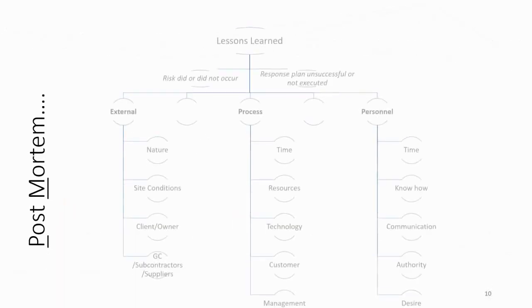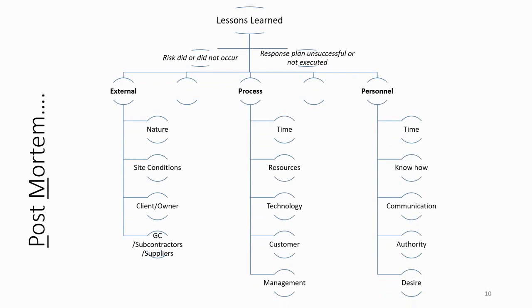In evaluating the results of the risk management plan, this particular graphic can be useful. The flowchart's a guideline for evaluating response plan results. Each response plan should have a record associated with it, clarifying whether the plan worked or not, and whether it was even executed or needed. If it was unsuccessful, an assessment of the factors that led to its demise are often useful for a future record. A good response plan recording tool has the ability to incorporate this kind of record into it.